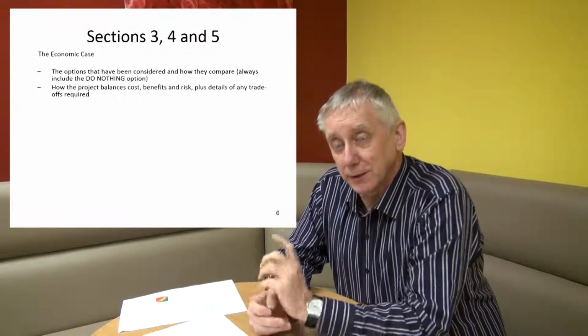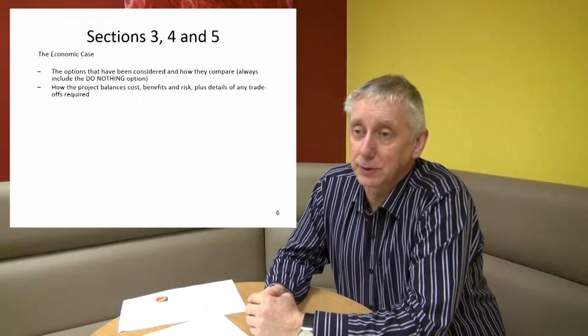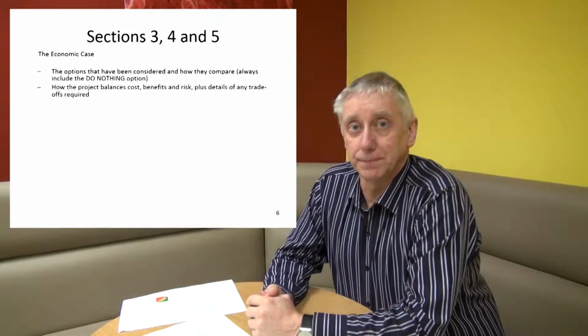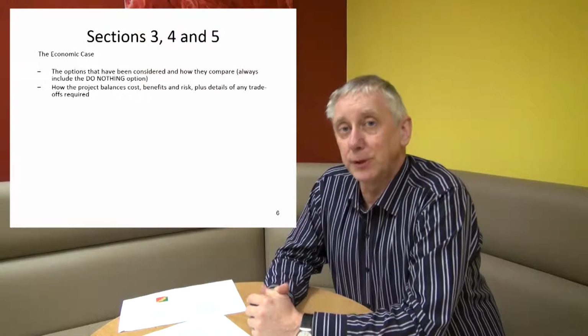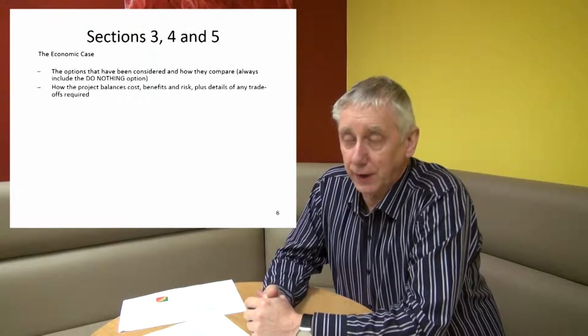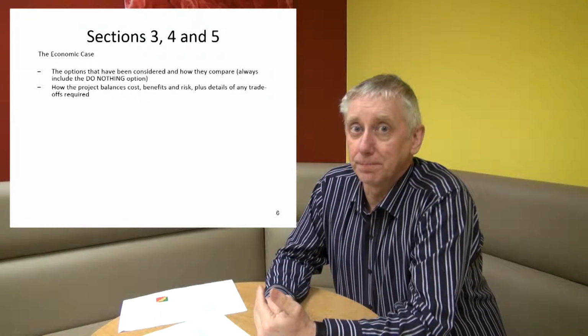You also need, and this is regularly forgotten by people who don't do business cases for a living, you need to include what I call the do nothing option. In other words, what would be the implications if we didn't do anything? I've seen business cases fail not because the ideas that they put forward were not brilliant.